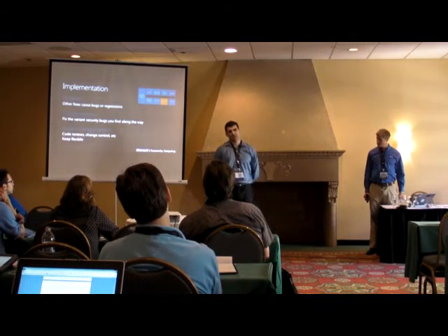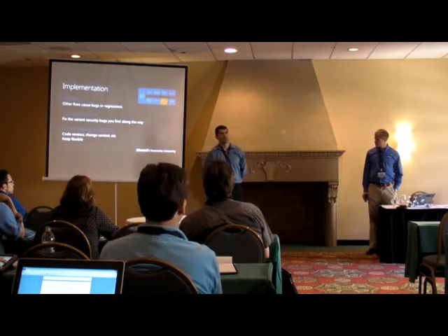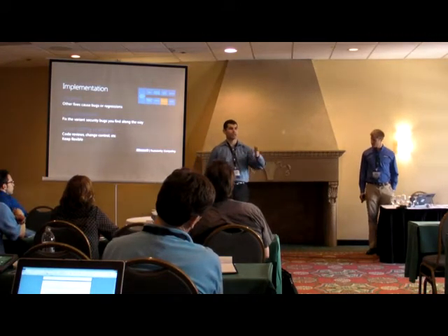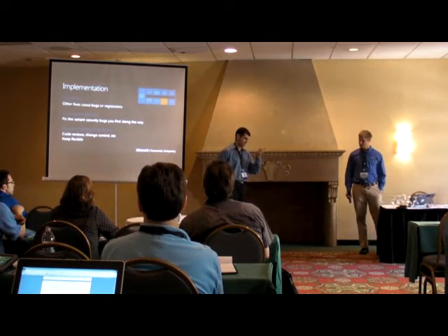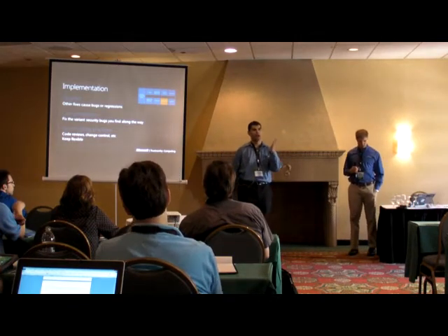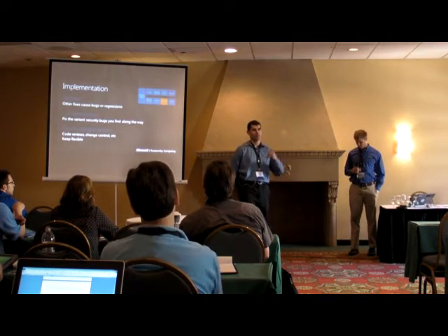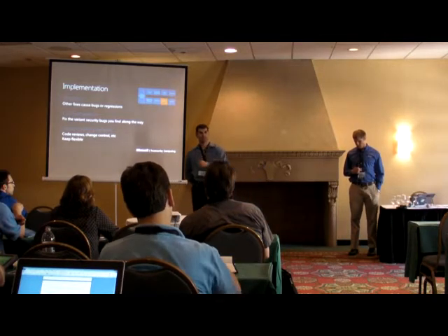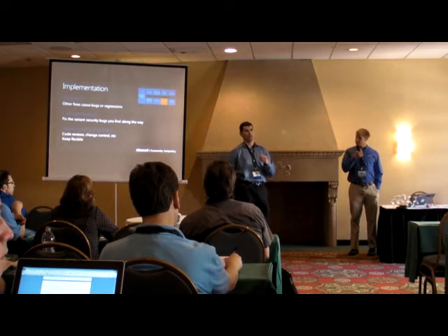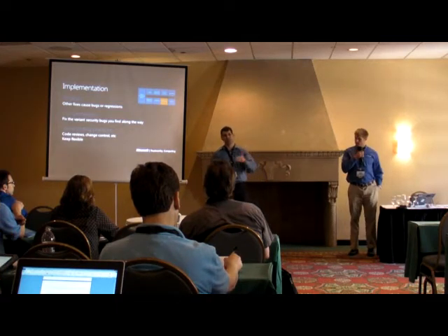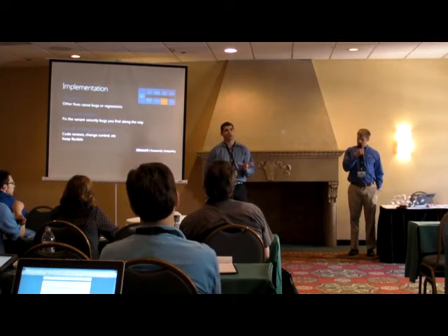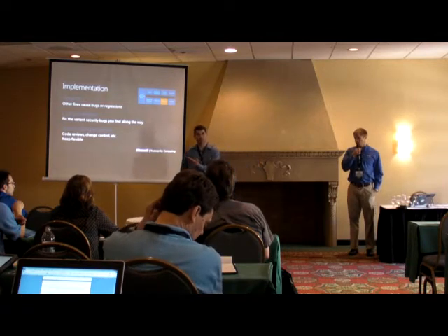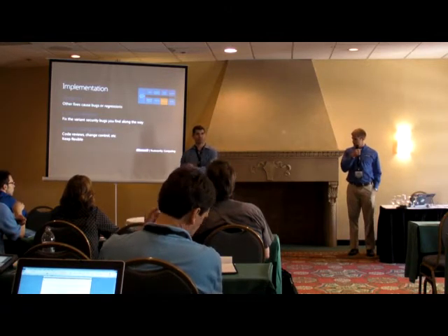Depends on the product team, depends on the complexity of the code. Obviously there's standards out there, right? So, for example, iDefense, ZDI have 180 days, so we absolutely target that. So we try and target 120, and then that leaves us room to bounce, if you will, or slip. And so a lot of times we'll try and do 60 or 90 even, but it all comes down to testing. So we can't predict the problems that could arise in testing. And so if we cause a regression, obviously we have to go back to the drawing board.